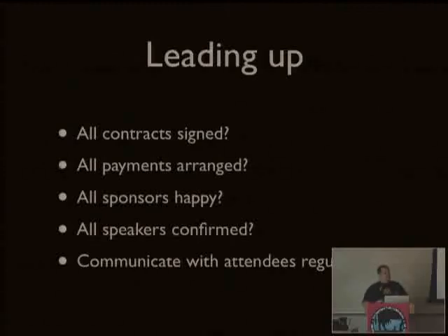You want to talk to your sponsors. If you've made arrangements with your sponsors and they're on their way and everything's fine, call them anyway. Maybe a week or 2 weeks before your event actually happens, call them, touch base. Go over all the agreements that you have with them in terms of, we're going to have a table for you, we're going to have 2 chairs, we're going to have this, you're bringing these people. Just go over it with them. Make sure that nothing changed and they forgot to tell you. You want to keep your sponsors happy.